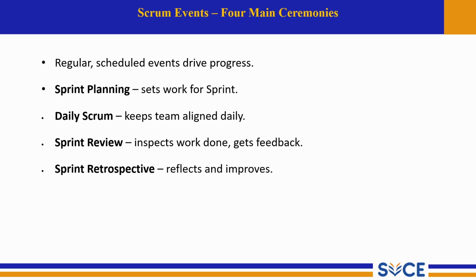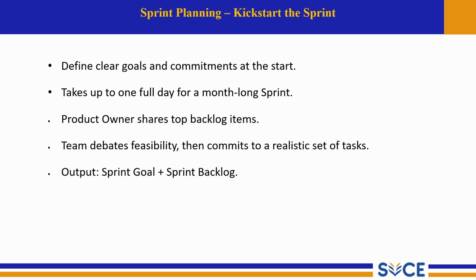In the next slide, we will see sprint planning, the kickstart of the sprint. Sprint planning defines clear goals and commitments at the start. It takes up to one full day for a month-long sprint. The product owner shares top backlog items. The team debates feasibility, then commits to a realistic set of tasks. The output is the sprint goal plus the sprint backlog.